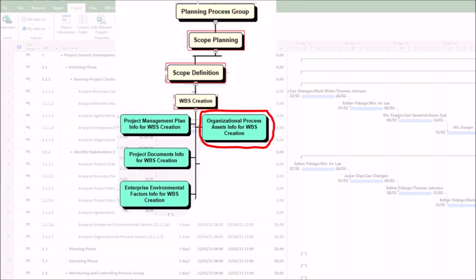As a real-world example, let's imagine that a construction firm ignores its organizational process assets library of past project WBS documents and creates a new WBS from scratch. Later, they realize, first, they forgot to include permitting as a work package, a recurring deliverable in past projects. Second, the WBS mixes phases and trade contractors inconsistently, causing confusion in reporting. Third, the project faces delays because critical dependencies were missed.